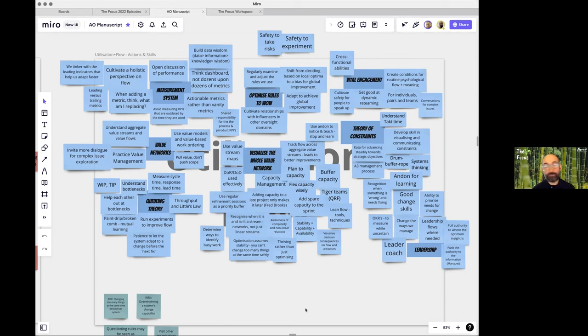Now, what usually happens, and you might have seen this before, is people notice our capacity is 6 story points. And what do they do? They say to themselves, oh, no. We will be so much more efficient next sprint. We will be so much better. Let's plan for 12. And what actually happens is, again, they deliver about 6. And it's as if we're affected by amnesia and we forget completely that, okay, we just failed and we only accomplished 6. And we say to ourselves again, no, it was a fluke. Let's do it again. Let's aim for 12 again. And we again deliver about 5 to 6.